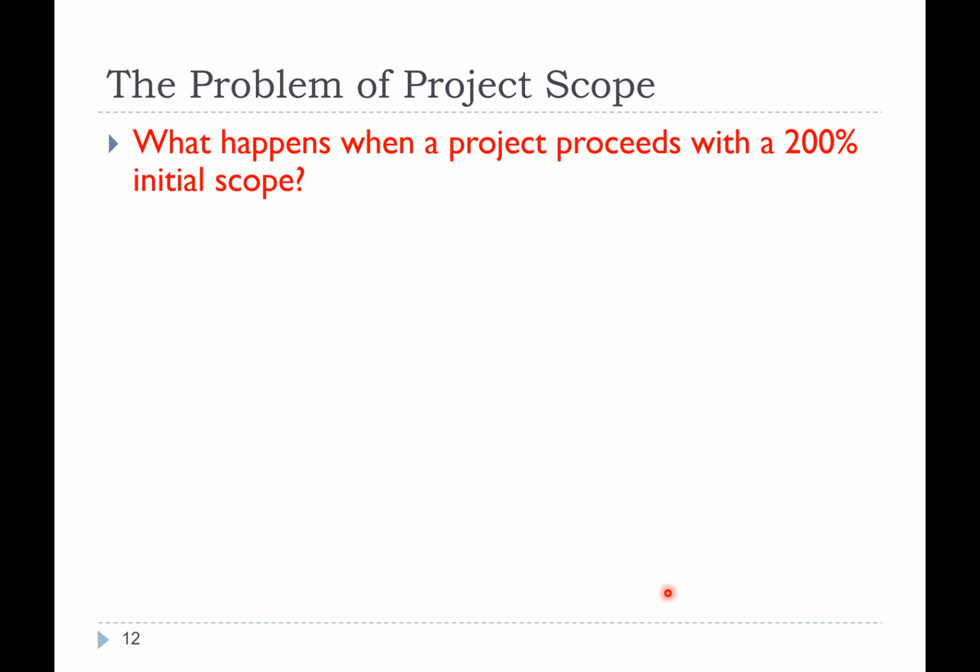So what happens if the scope actually requires twice the amount of resources that I actually have? Best case scenario, I'm going to develop 50% of the things that I decided I wanted to build. So for my big list, I just did 50% of it. That's actually the best case scenario. Normally it's not even that, because a lot of the things I do in development are not just spending 1 week building this feature, 1 week building that feature, and going week by week. Sometimes you gotta invest time in creating an architecture, some subcomponents or subsystem that is beneficial to the entire system, so that this next feature plugs in here, and the next feature plugs in there, and so on and so forth.